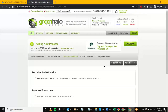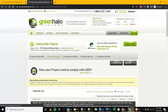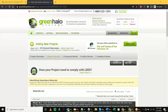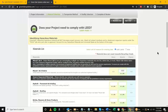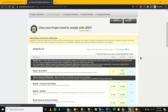James interjects: this is the function currently performed by Form E in your regulation packet and often in contract specs. The volume-to-weight conversion ratios no longer need to be manually performed — the system does it on the back end for the contractor. It will also calculate the recovery rate as you go along when you start selecting facilities and end markets. The system tracks what 1,000 cubic yards of mixed C&D debris converts to in tons, with a different conversion rate for concrete versus drywall.